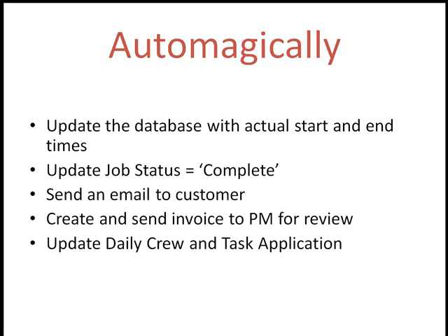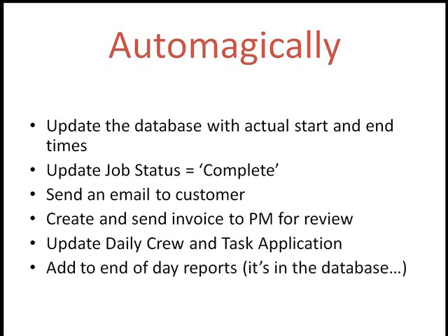On the Seamless Wall's daily crew and task planning application we looked at a few minutes ago, where each crew had 2 timelines, a planned and an actual one, the real start and end times for the task get filled in on the timeline that's labeled actual, and it's done in real time. The data is added to the end of the day reports. Actually, it's not, but it's in the database, so when our reports are run automagically at the end of the day, the actual start and completion time for this task as well as all the others are automatically part of the reports.